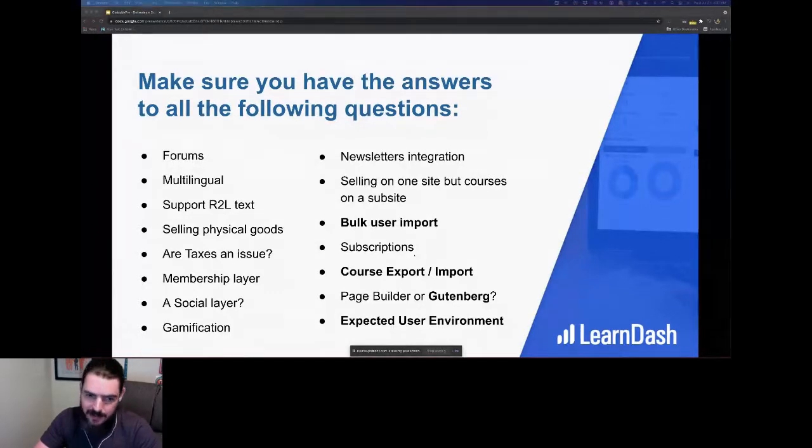everything connected. We were able to get a good export from WordPress, but that got us a little bit. So we weren't prepared. Now there are tools, and we were able to write something that turned into a little bit of custom work. There's now a plugin available to help with that, but something like that got me. That got me a good 2 days worth of time. It was unexpected, 16 hours worth of work gone.